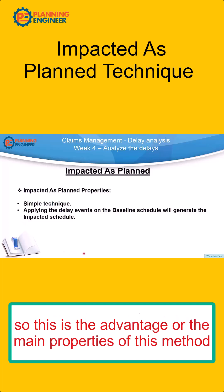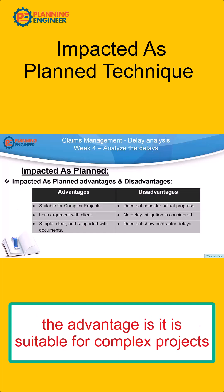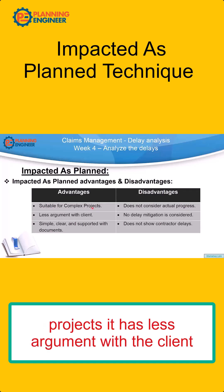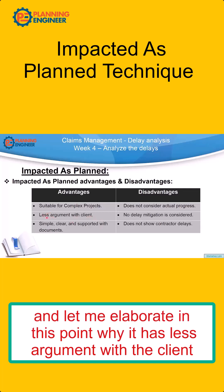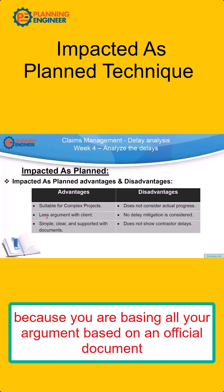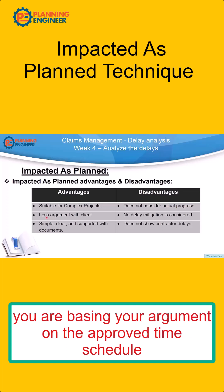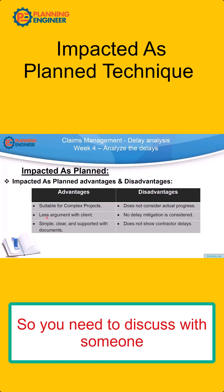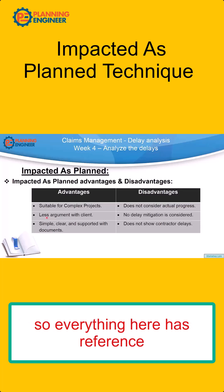The main advantage of this method is that it is suitable for complex projects. It also has less argument with the client, and let me elaborate on this point. It has less argument because you are basing all your arguments on official documents — specifically on the approved time schedule, which is an officially approved document.